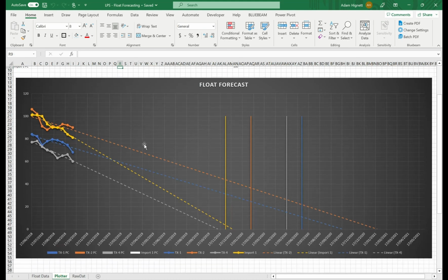On the screen you'll see three sets of data actually, because we're using trend lines as well, so we're using some forecasting data. So the vertical lines where they intersect represents each area and its contractual completion date. So this particular project has got 4 areas with contractual completion dates. And then the line graphs are plotting how much average total float remains in each one of these areas. Now obviously that's built up of a number that's very close to or actually is 0 if it's critical path, all the way up to larger numbers. So this is just taking an average.